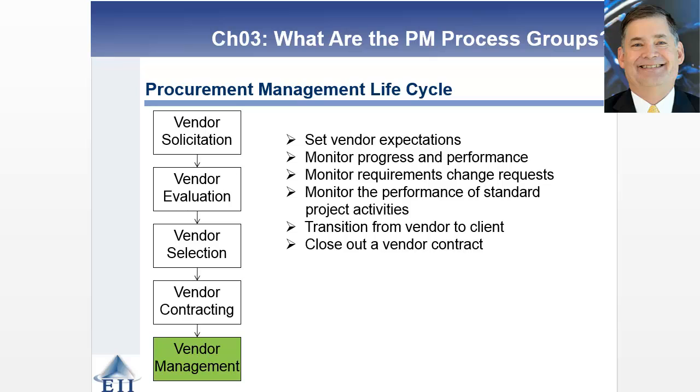All right, a couple of more things here, and again, I'm going to move to the last slide, which is the vendor management. This is where you're setting up vendor expectations, monitoring their progress, and making sure that someone is actually paying attention to the contract and that the vendor is actually delivering the services that are promised. A lot of fraud occurs when you don't have this person, this role in place, where someone is monitoring the contract and making sure that they're doing what the contract that they agreed to specified.